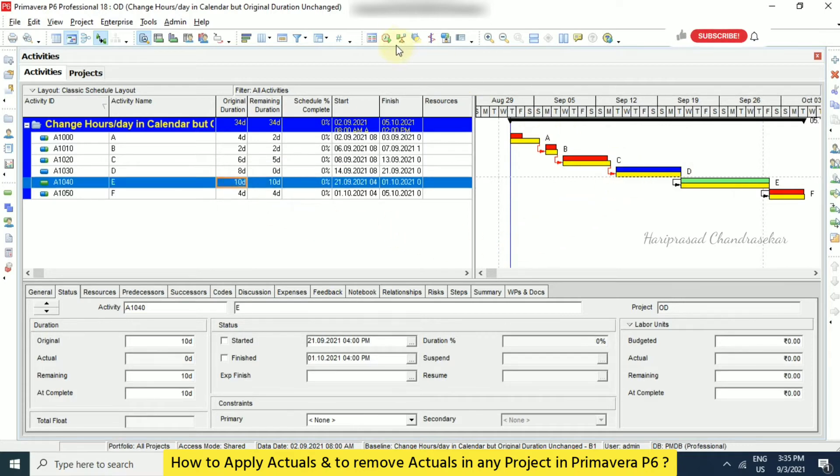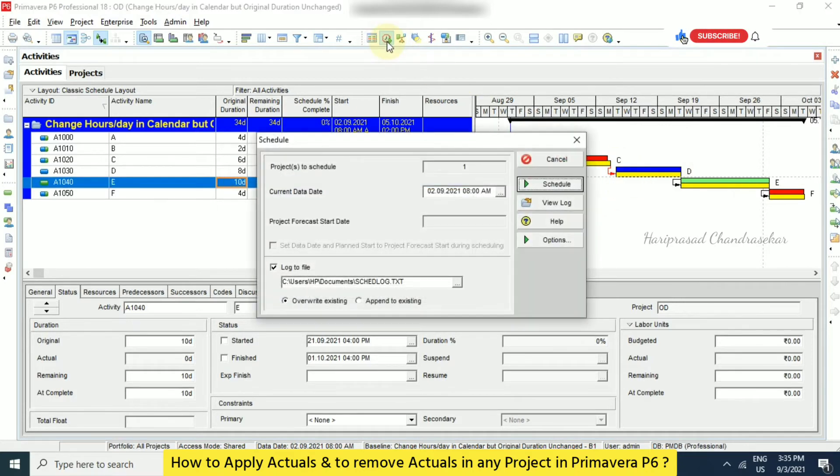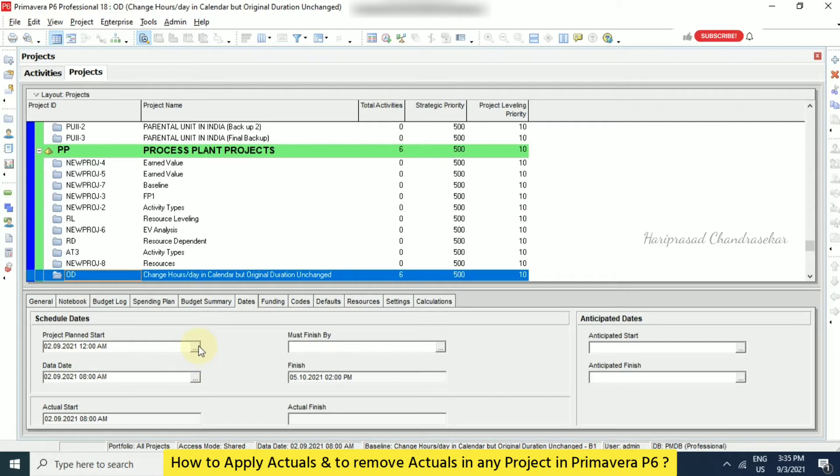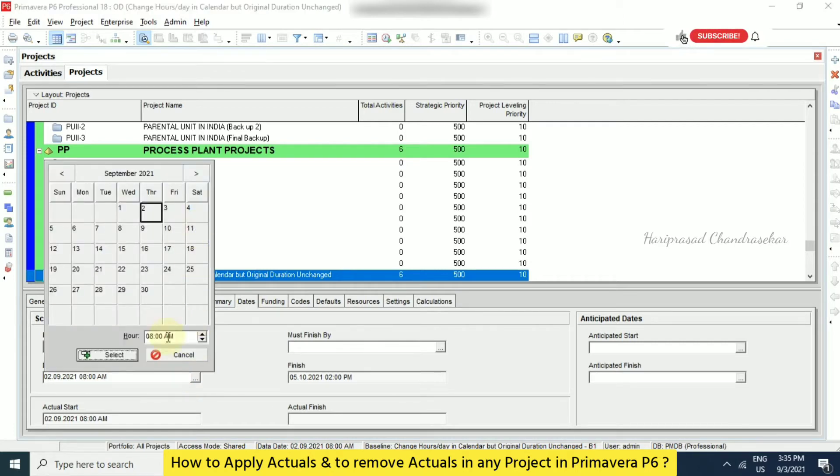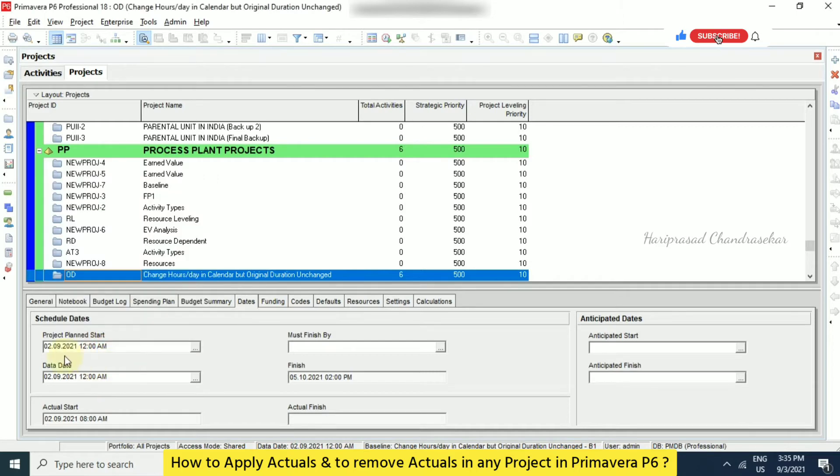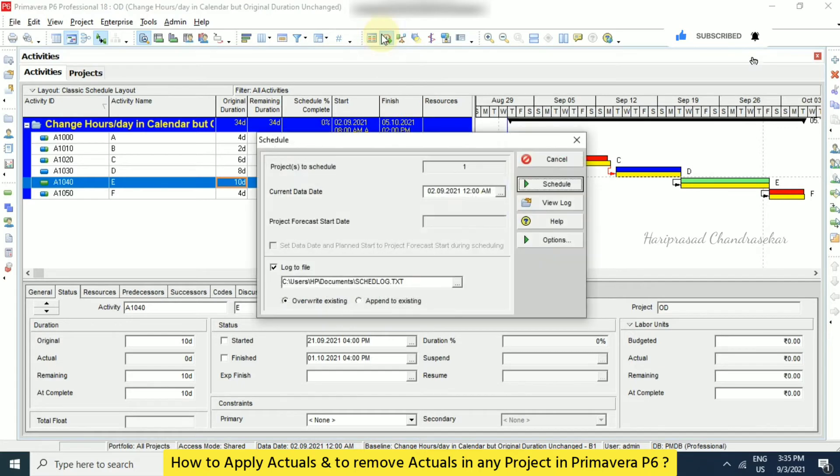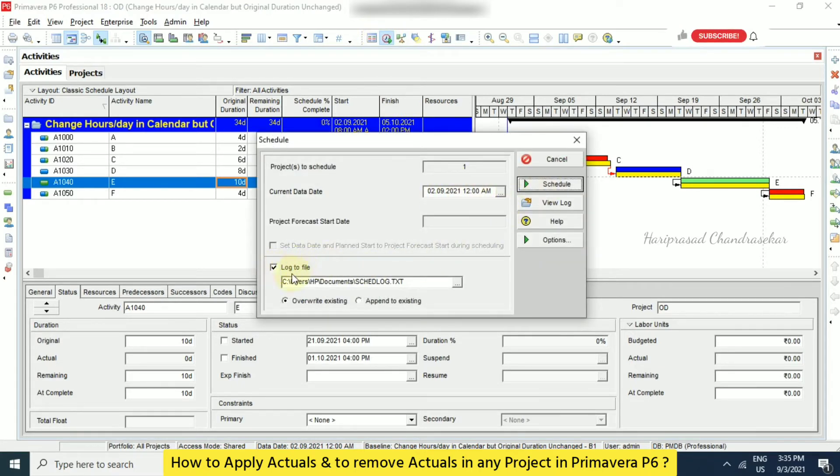So now we can schedule. And we need to choose the current data date. And before that, we need to check from the project. So from the dates, project planned start and also data date should be equal. So we can make both the same. Both should be same. Now we can go for schedule. See here it is updating. Now we can save our log to file and then we can go for schedule. So this log file will be in documents.